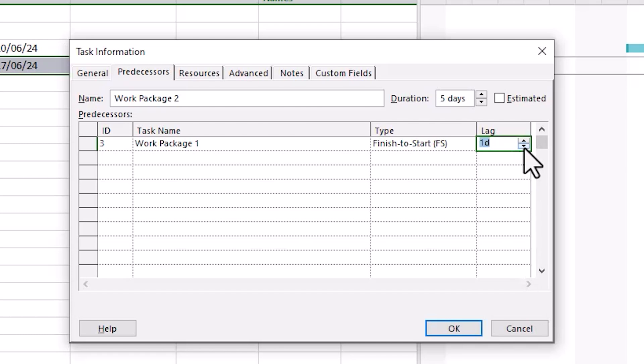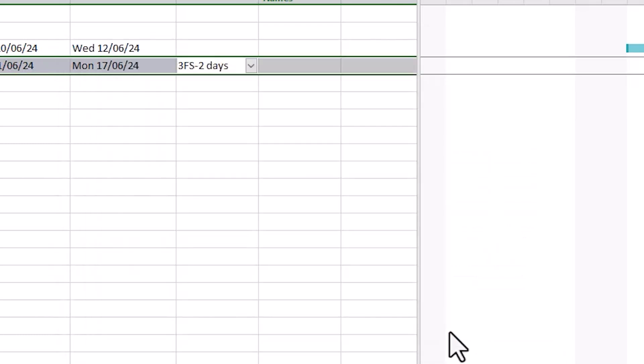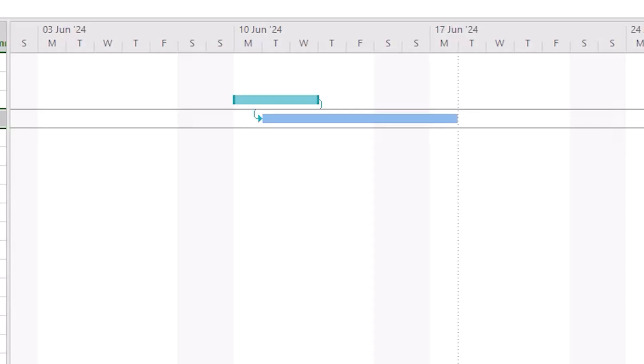When you get used to seeing these relationships and working with them in this way you may find it gets much quicker to just directly enter the details here rather than clicking to open the task information window. In this example I've set lag to minus 2 days and you'll see now that the task is due to start 2 days before the end of the predecessor.